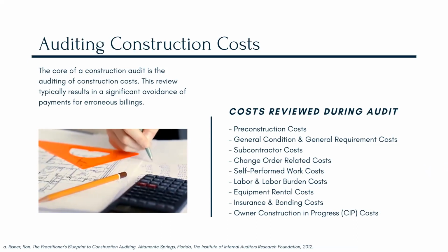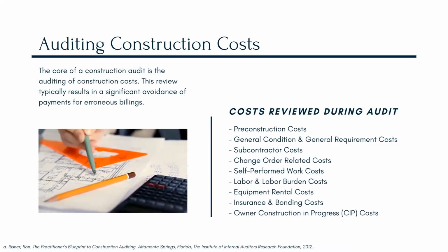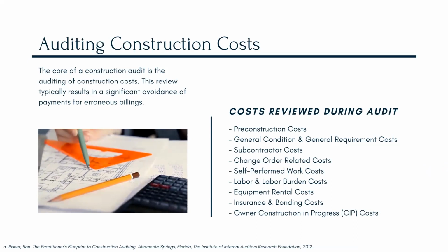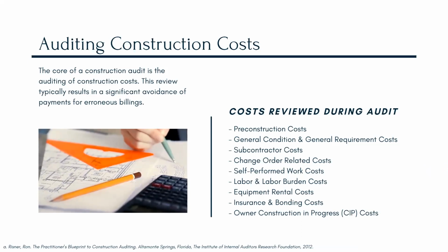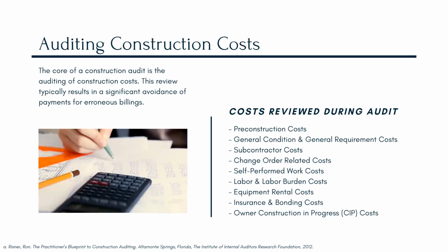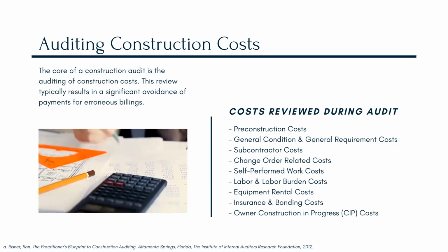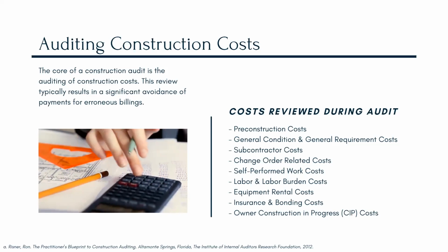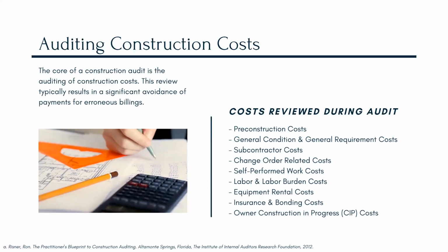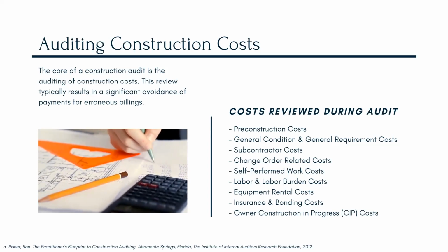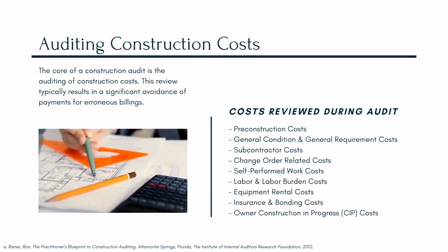And always check that the scope of the change order is not already included in the scope of the original project. If there's not a true change in scope, then a change order isn't warranted and could potentially add additional costs out of the owner's pocket on a faulty basis.